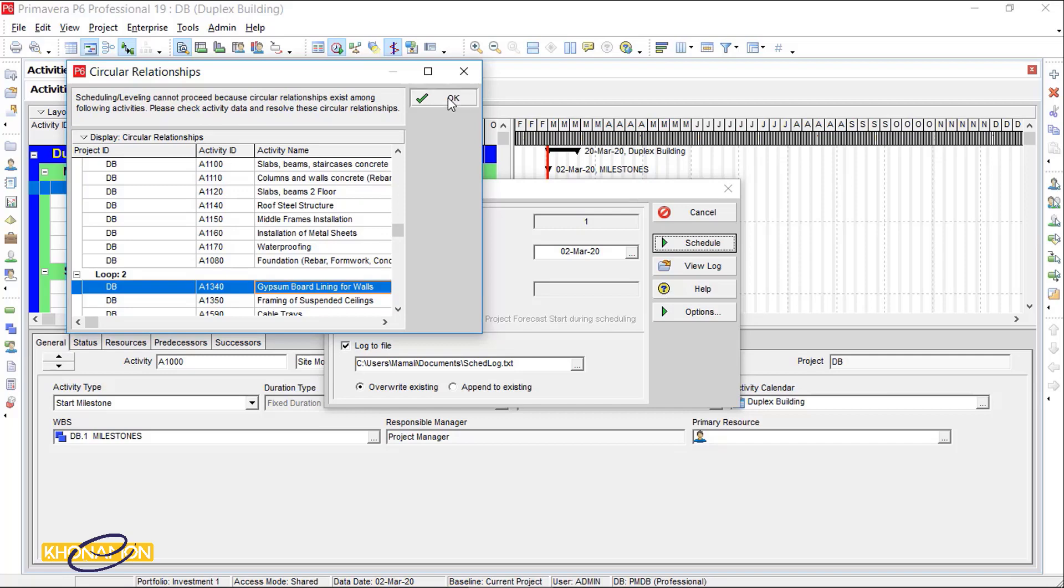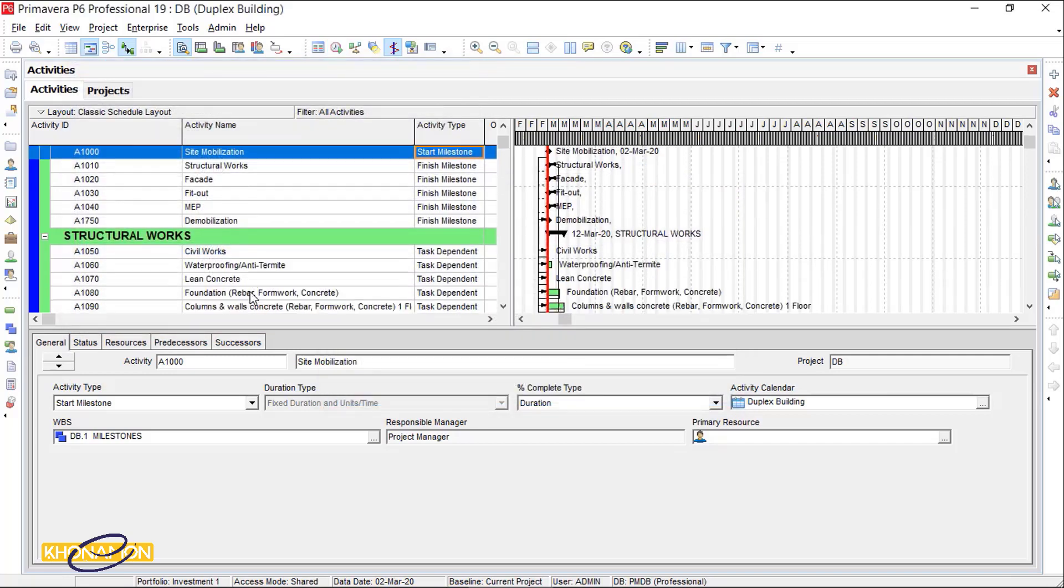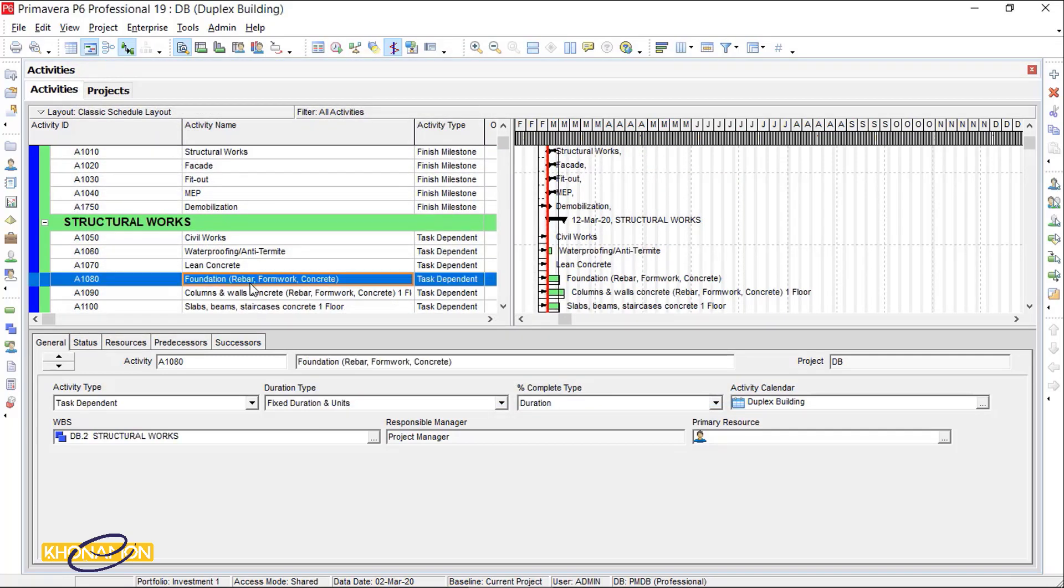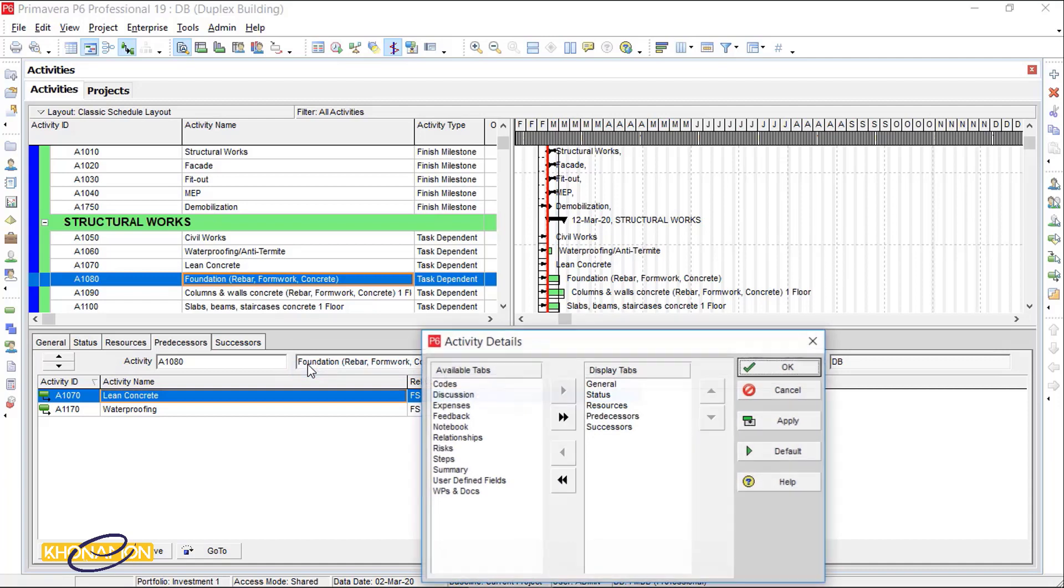I go back to my plan and find the foundation to recognize the logic of this loop. I want to see predecessors and successors together. So I right-click on the detailed window, click on Customize activity details and select relationships.